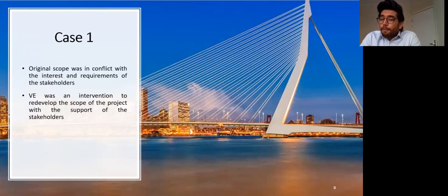Now, to answer our main research question, value engineering can help in resolving the barriers for implementing the three enablers for enhancing flexibility. We took 2 infrastructure projects and interviewed the project team involved in the respective projects. So in the first project, or case 1, during the development of the scope, the client did not involve the main stakeholder closely. Their requirements were collected, but they were never implemented in the final scope.